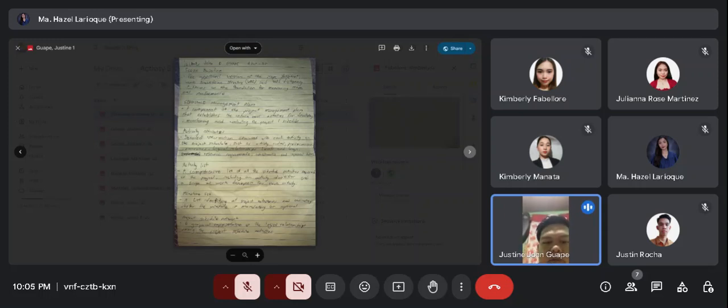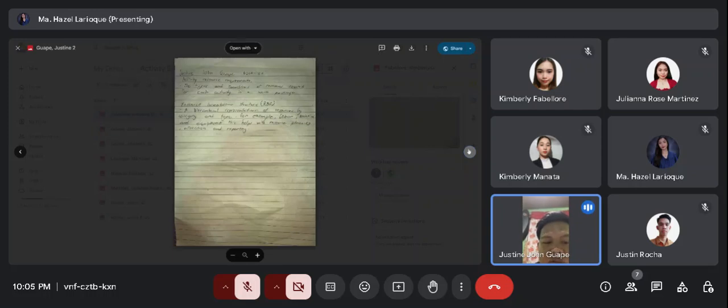Milestone list. A list identifying all project milestones, indicating whether the milestone is mandatory or optional. Project schedule network. A graphical representation of the logical relationships among the project schedule activities. Activity resource requirements. The types and quantities of resources required for each activity in a work package.